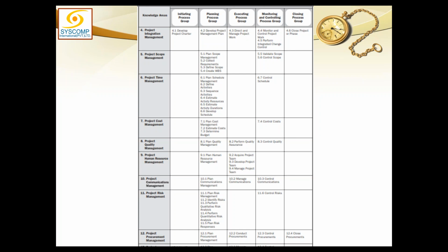If this risk happens or is about to happen, then monitoring and control will invoke the contingency plan, amend the project management plan, and tell the execution in direct and manage project execution to do that job that would cater to the risk. But as such, risk itself does not do anything in execution. But control risk is responsible to keep an eye on all the risks which have been identified.